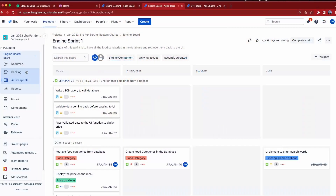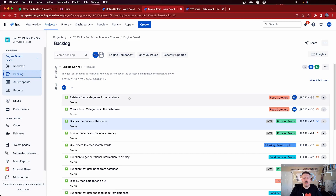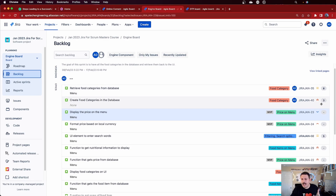When we're inside our company managed project, let me show you how the story point field behaves. When you are planning your sprint, you go to every story and you'll see an icon — a bubble — which represents the story point. If your board settings are configured to represent story points, you could change it to be based on original estimate or some other variable, but for the most part you're going to want to use story points because that's the industry standard.